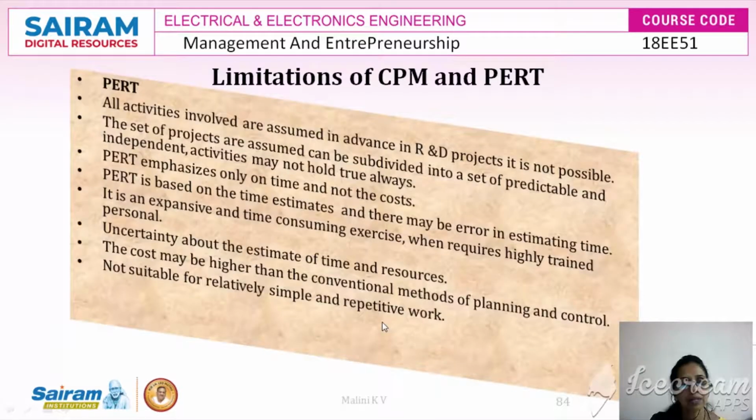So what are the limitations of PERT? All activities involved are assumed in advance. So in an R&D project it is not possible. The set of projects that are assumed, that can be divided into predictable and unpredictable activities, that may hold true, but it always emphasizes time and not the cost.